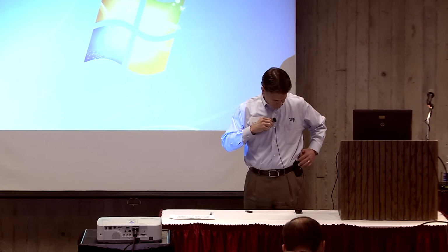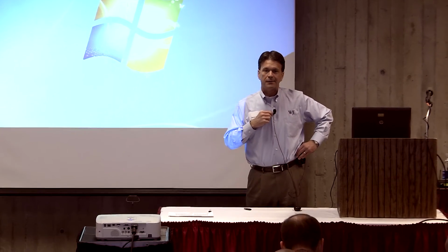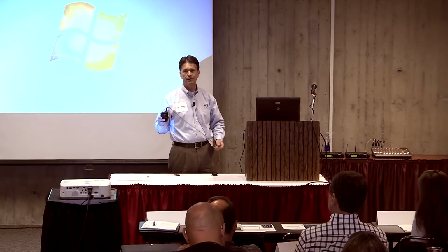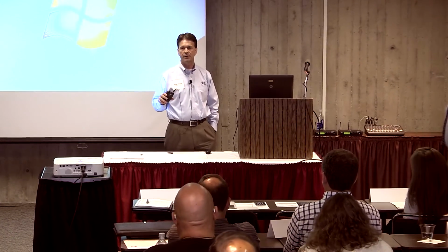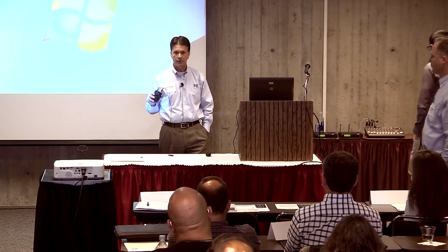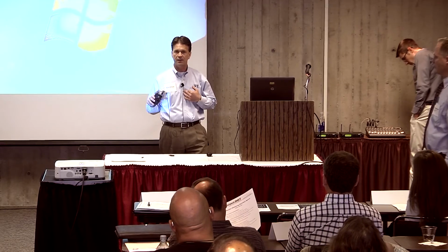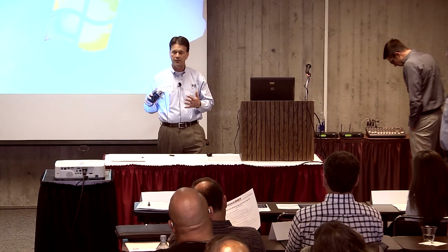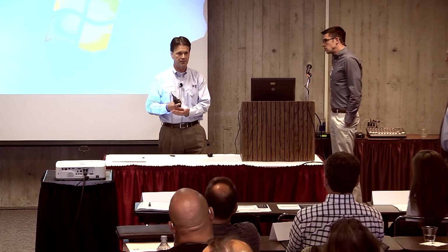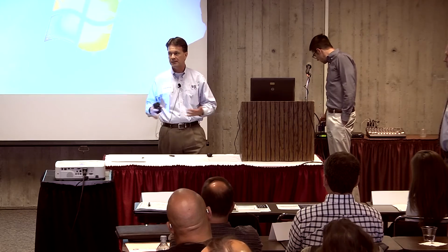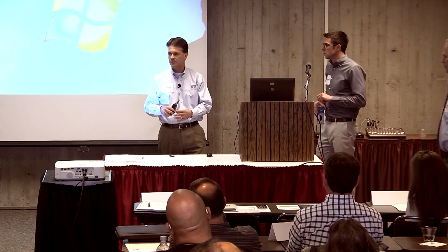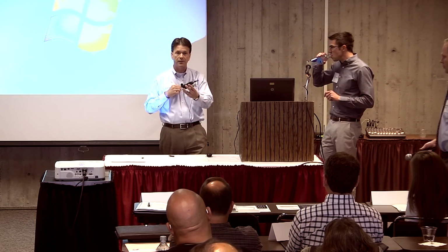That's what I'm just wondering, if they do a project, assume they're going to be able to do it a certain way, and then we set up the monitoring and find out, hey, they can't do it the way that they do it. Yeah, we're working right now for Turner on the new Caterpillar headquarters in Peoria. It's not a secret anymore, I can say that. I don't know when it's going to kick off, but Turner is using us extensively to try to avoid, really their risk is schedule delay with a huge project like that. So they're thinking, how can we avoid exceeding the limits and disturbing the neighbors on a big project by engaging you? And so we're helping them, we're doing some trials and things for them in advance. So that's an example.